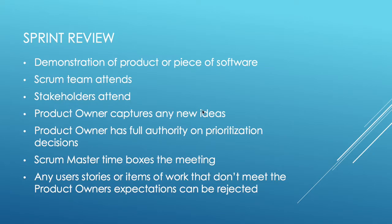Everyone observes — they're writing down improvements and extra requirements, and they feed this back to the product owner. It's the product owner's job to capture these new ideas and new requirements, and effectively prioritize what is necessary and what isn't.